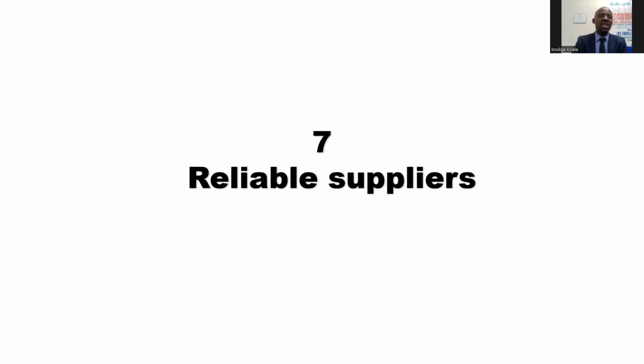Because sometimes people can tell you, oh, even if you need like 1,000 of them, I have them. Meanwhile, they only have 50, or they have 100. If that's the case, at some point your project is going to stall. You're going to come to a stop where you can't continue, because you already paid the person, but they're not able to provide you with the materials when you need them. And what that does is, your project takes longer to be completed, and while you're waiting, you keep investing in that project. That's going to be a waste of your money, your resources, and your time.